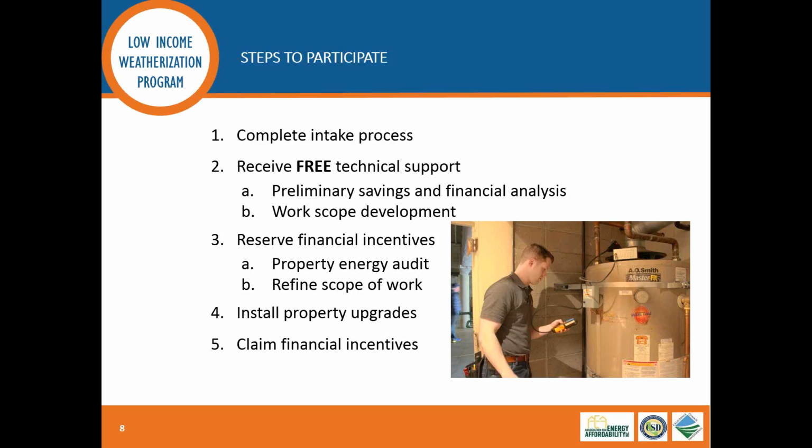Or maybe they don't have, and we see this all the time, any experience working with some of these contractors doing more complex energy efficiency upgrades, and so they would ask the program, do you have any contractors that can do this work? In all those instances, we would say, here's the list of currently approved contractors in the program, here's what they can do, here's the regions they serve, and then the owner would reach out to you guys directly to have you provide proposals, and if it's a rather complex project, even have you come to an on-site pre-bid meeting, which we can be on-site for and help support.